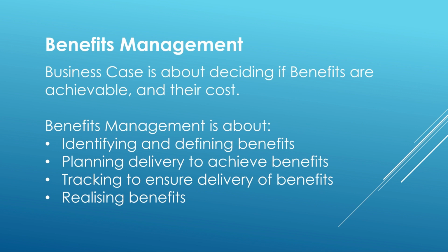Now, the other point of the business case, apart from evaluating all of those cost versus reward, is we need to consider what the benefits management side of this is. So the business case is about deciding if those benefits are achievable and the cost of achieving them. So what we want to do, can we do it or should we do it considering those costs? What we're going to take forward is benefits management that's going to pass on through the project manager to the next area. So benefits management is about identifying and defining the benefits from the business case in more detail, making sure that we're able to measure and understand, have we achieved that benefit? A benefit to increase profit isn't a very good structured target. A benefit to increase profit by 10% is a measurable one, so we would want to define that.